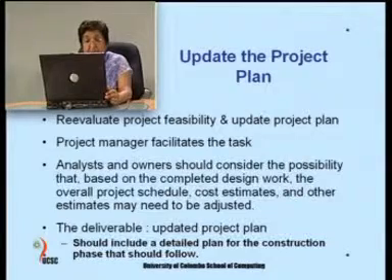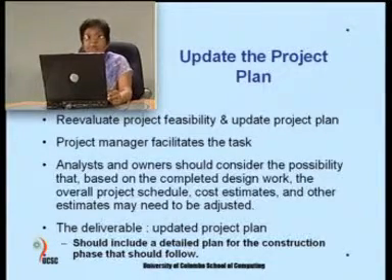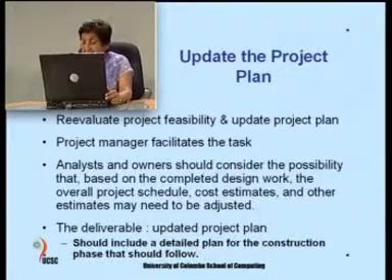So, the deliverable at the end of this should be an updated project plan, which should include a detailed plan for the construction phase that should follow. So, it is immediately after this that you will actually go into the actual implementation or construction of the system.